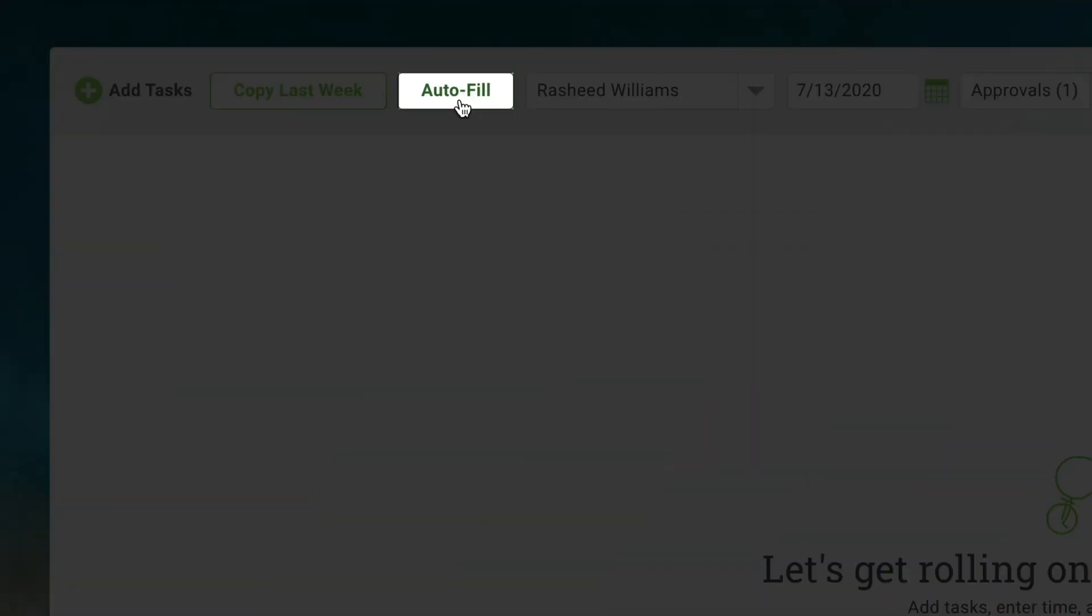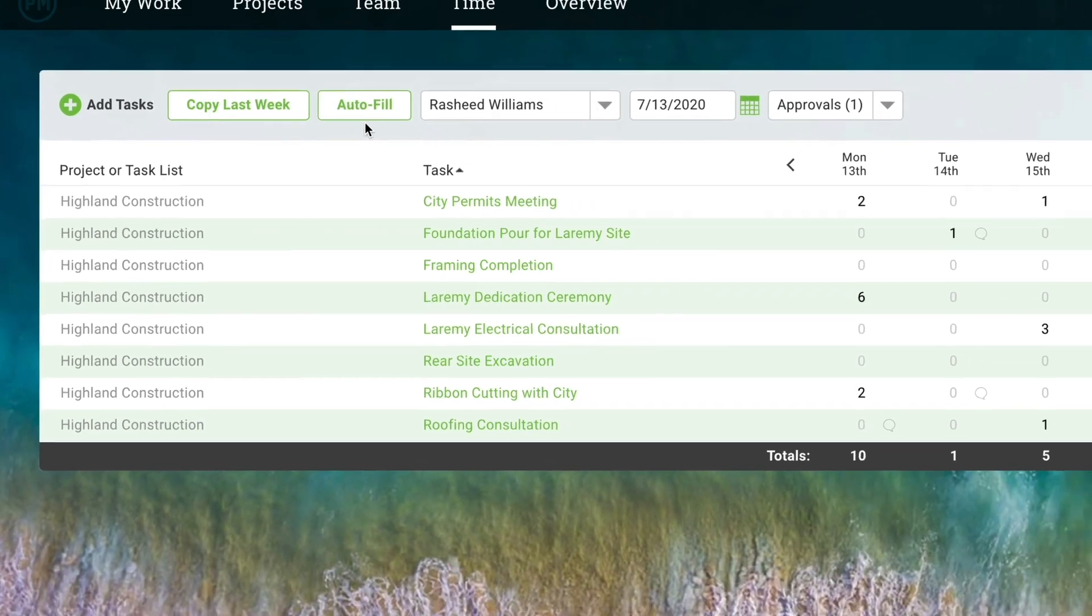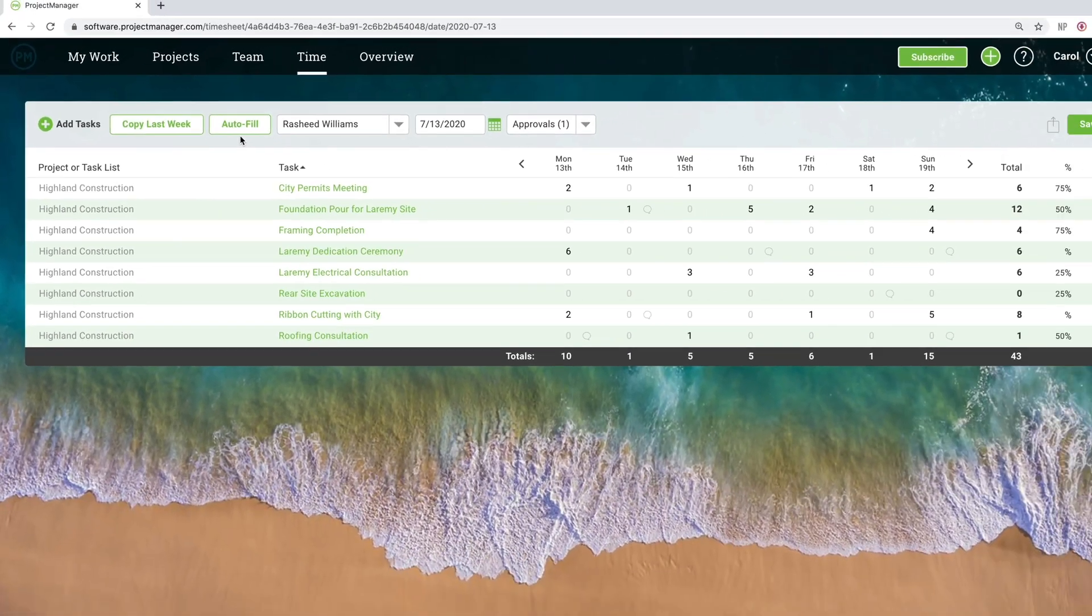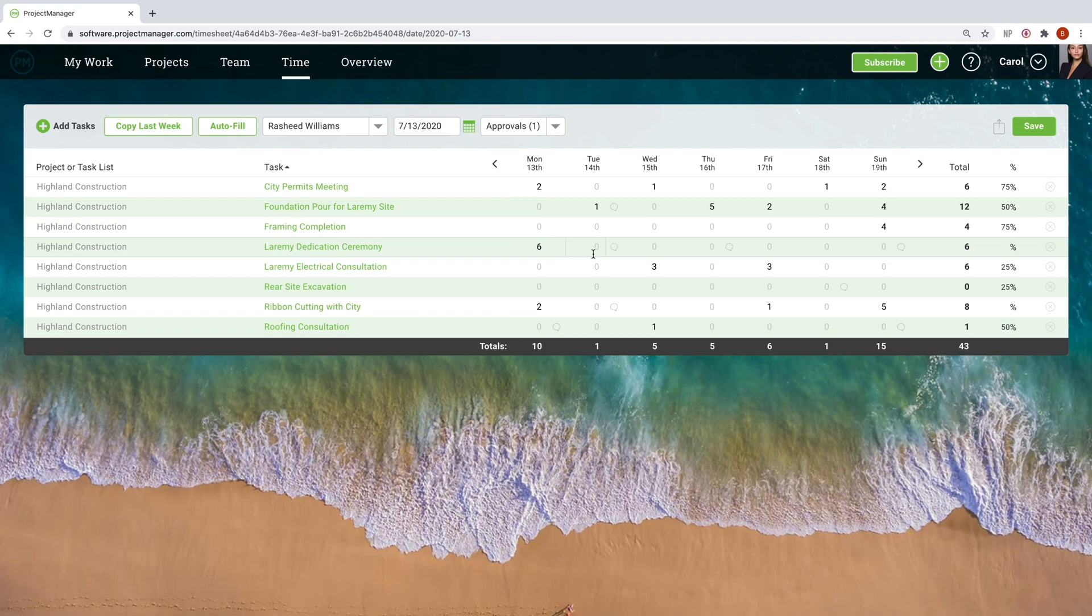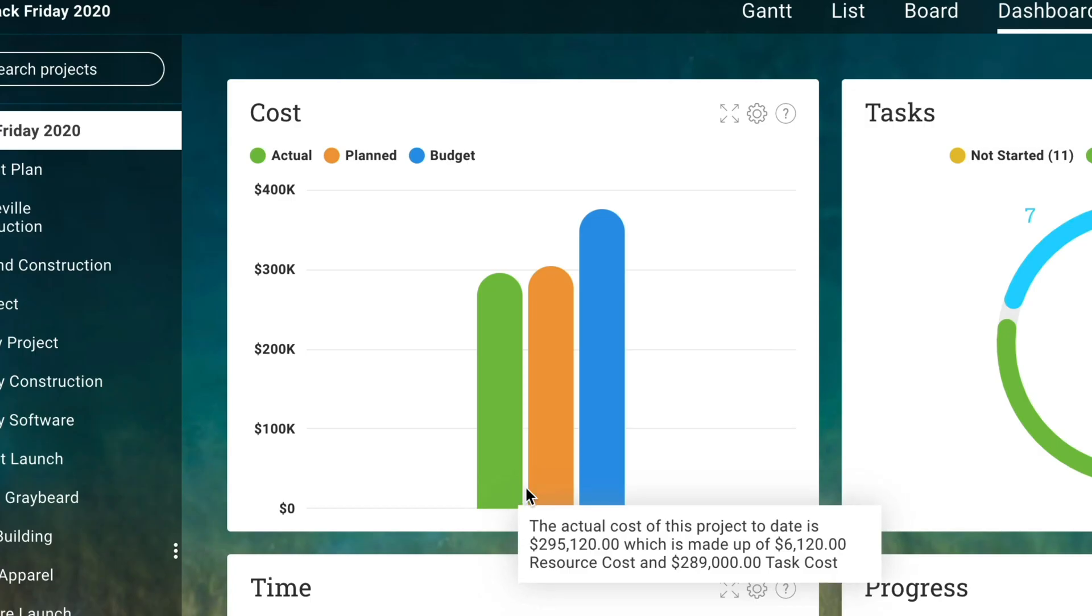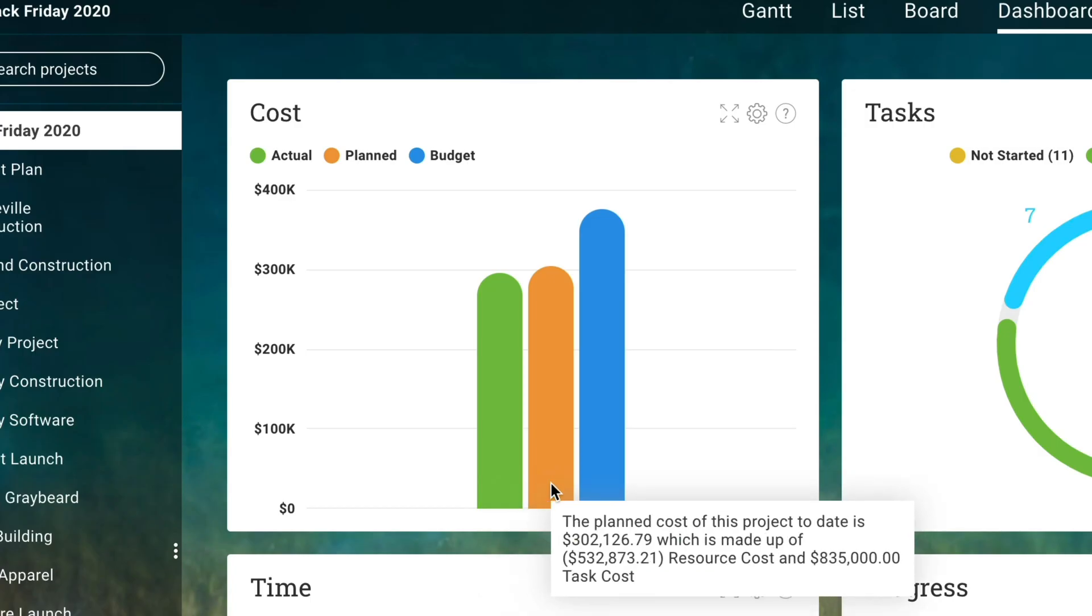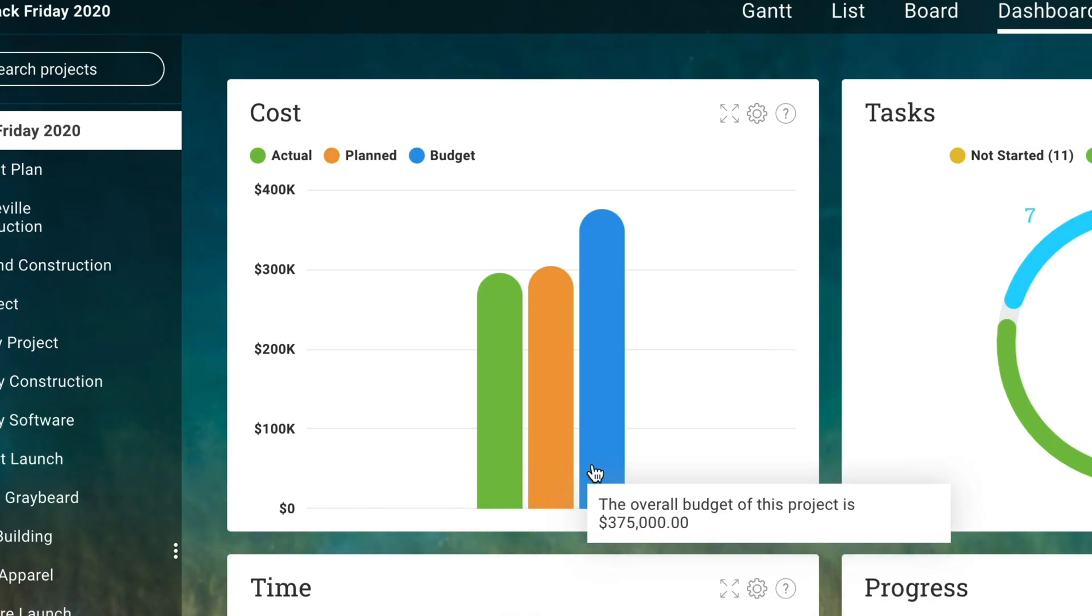Don't forget to ask your team to log their hours as they work. Accurate data lets the software automatically calculate project costs, slippage, and other key metrics.